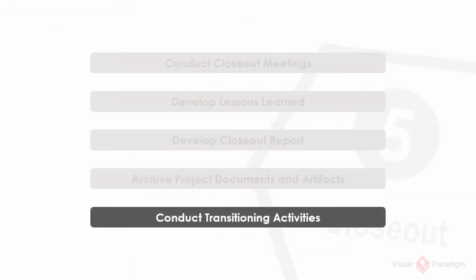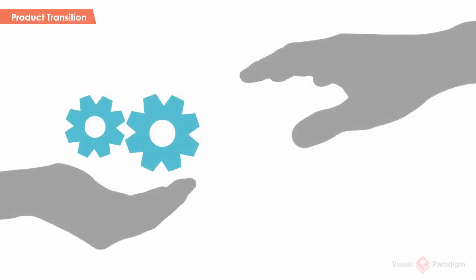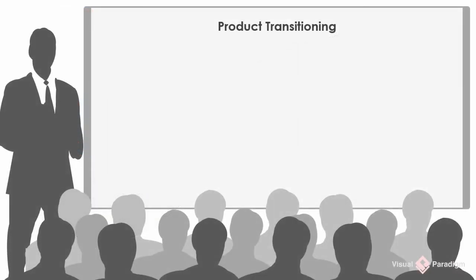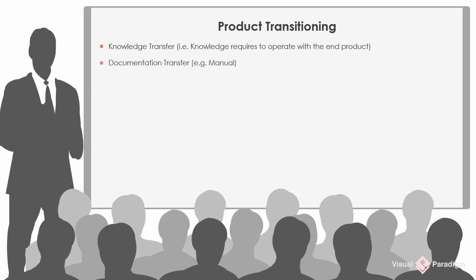Conduct transitioning activities. The project is near its end. You have to transfer the physical product and any other knowledge required to operate it to the operation staff who will use and maintain the product as an ongoing activity. The transitioning involves: knowledge transfer — the knowledge required to operate the end product, including understanding how the product integrates with business workflow, how features work, any login credentials required, assumptions made, and who can be contacted for help. A user training session is a good method for knowledge transfer. Documentation transfer — the written material giving instructions or information regarding product use. Physical transfer — physically turning over control of the product to the operational unit responsible for supporting it.